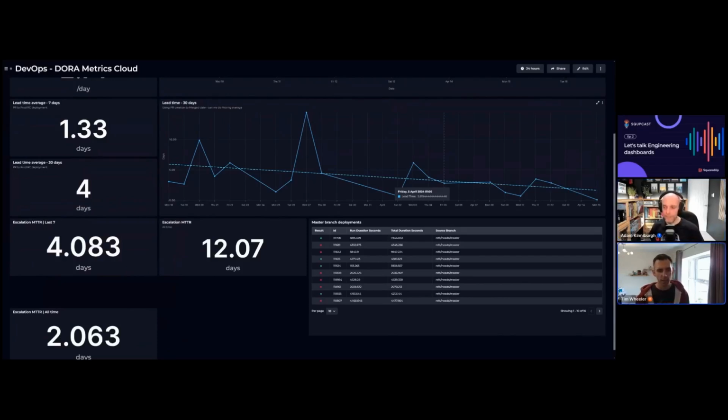Yeah, exactly. So this is really representing for us how long the process of code reviewing, any manual testing we want to do on top of our automation, and the actual CI/CD takes to get it through the pipelines, because obviously we run a lot of automation tests as these go through. What that's useful for us is to make sure our process isn't full of roadblocks, because it's very easy to say I've got amazing 10x developers all churning out features, but if they get stuck in test or in review, and they're not following the style or approach to coding that we want, and they have to keep going back, then you're going to see a very large lead time.